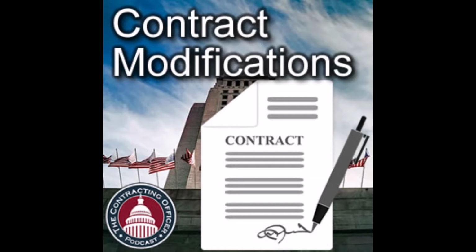But what this paragraph says, and I don't think that it's used enough, is that if there is an important contract modification that needs to happen to bring new capability to the government as soon as possible, you don't have time to complete the whole new spec and write an RFP and wait for the contractor to develop a proposal and negotiate it and then get it on contract.